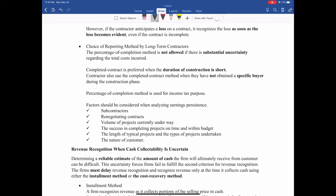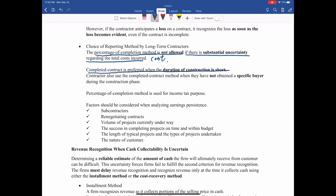There are some criteria regarding the two different methods for long-term contractors. The percentage of completion method is not allowed if there is substantial uncertainty regarding the total cost incurred — meaning we cannot get a reasonable cost estimate, so the revenue recognition would not be credible or reliable. The completed contract method is preferred when the duration of the construction is short. If it takes too long, this will make the information less useful and will have a negative impact on the firm's earnings quality. There are some other factors as well.